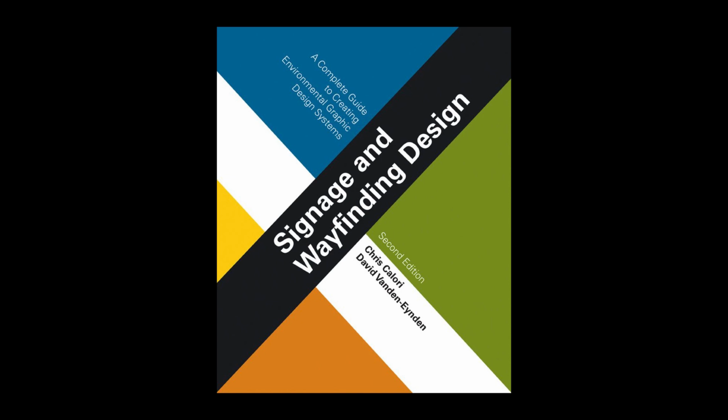A word about protocol during the bidding phase. To ensure a fair bidding process, all bidders should have equal access to the same information. Accordingly, unless otherwise arranged, the designer should avoid responding directly to any given bidder's questions and route all communications with bidders through the contract rep.